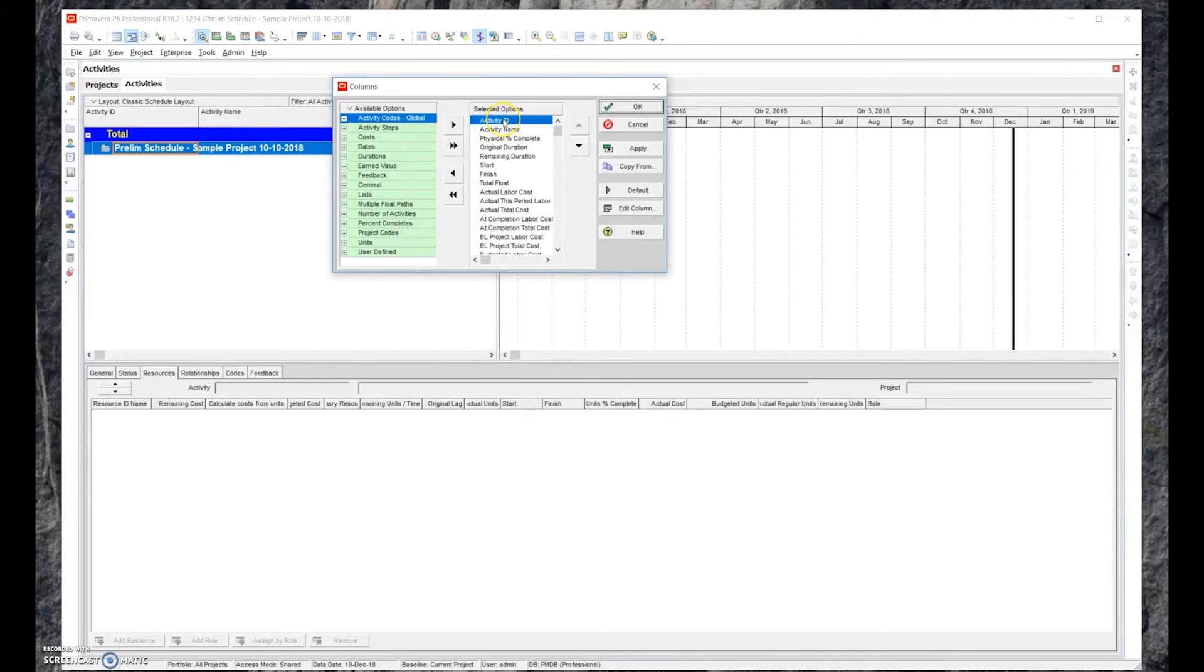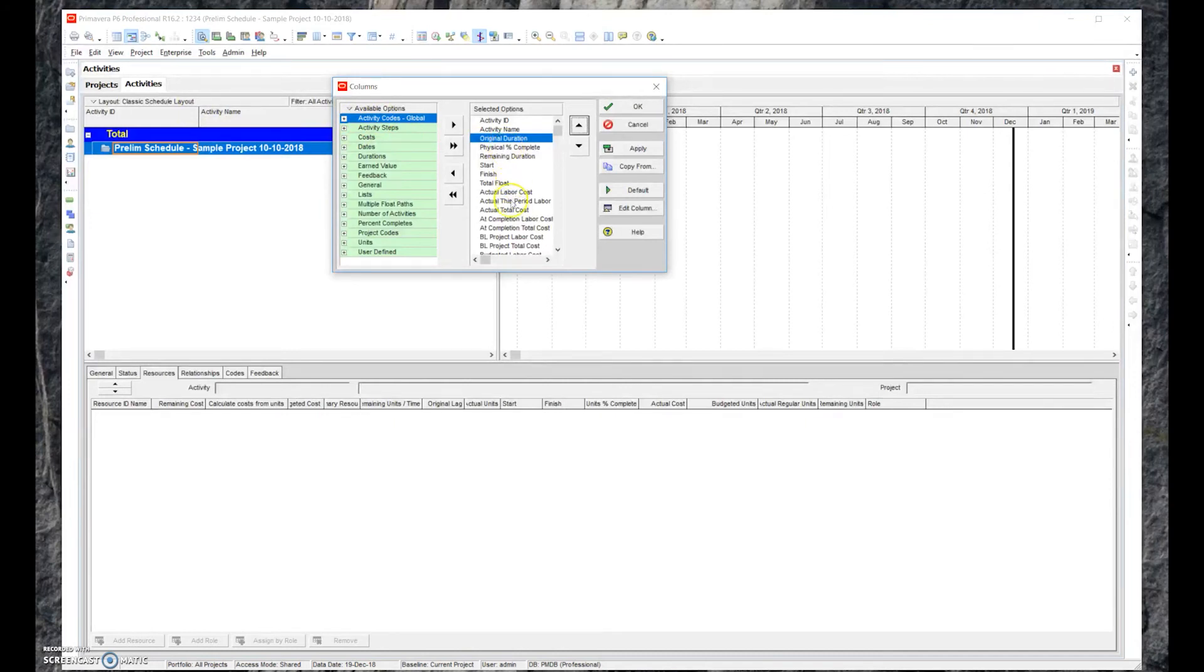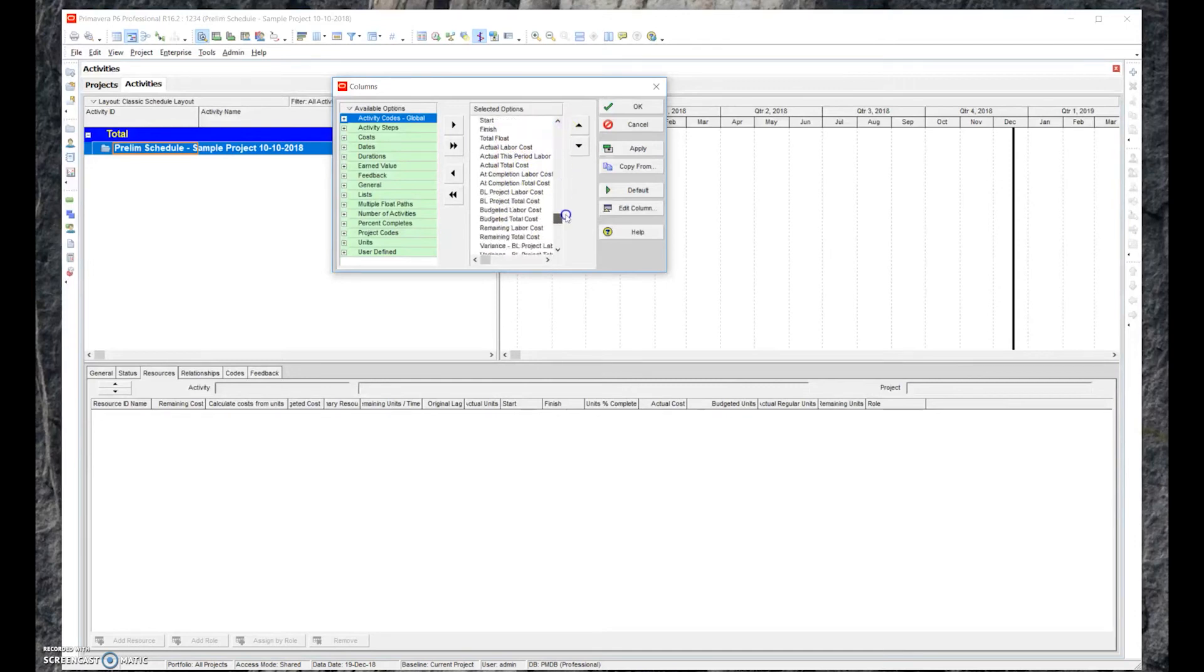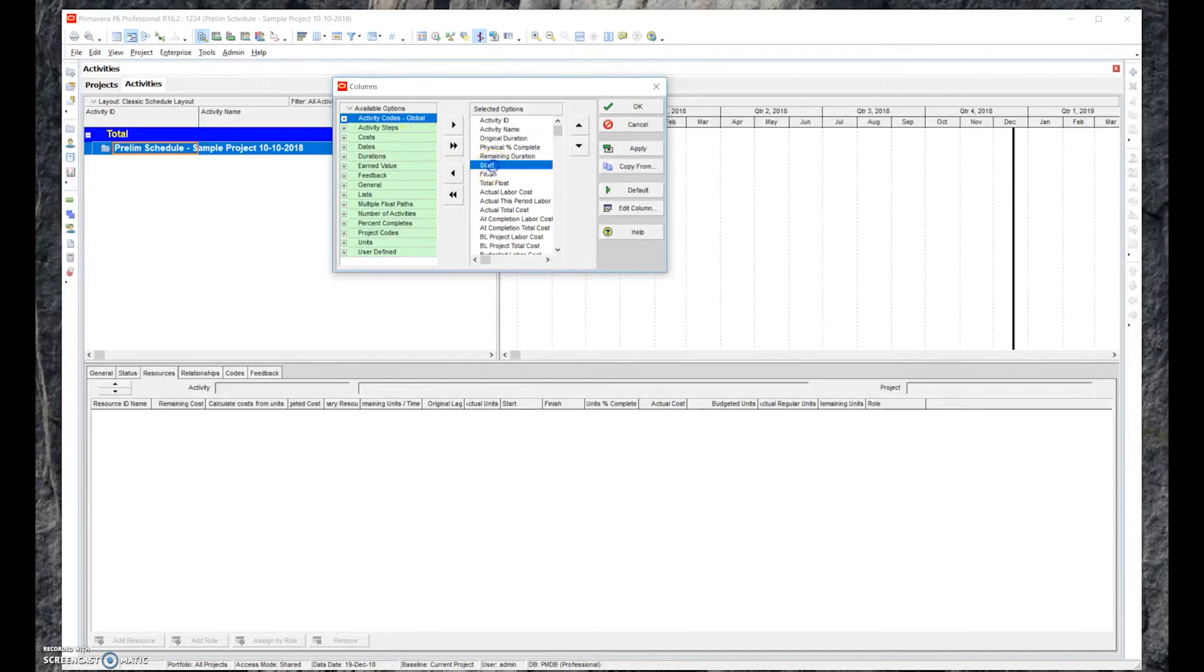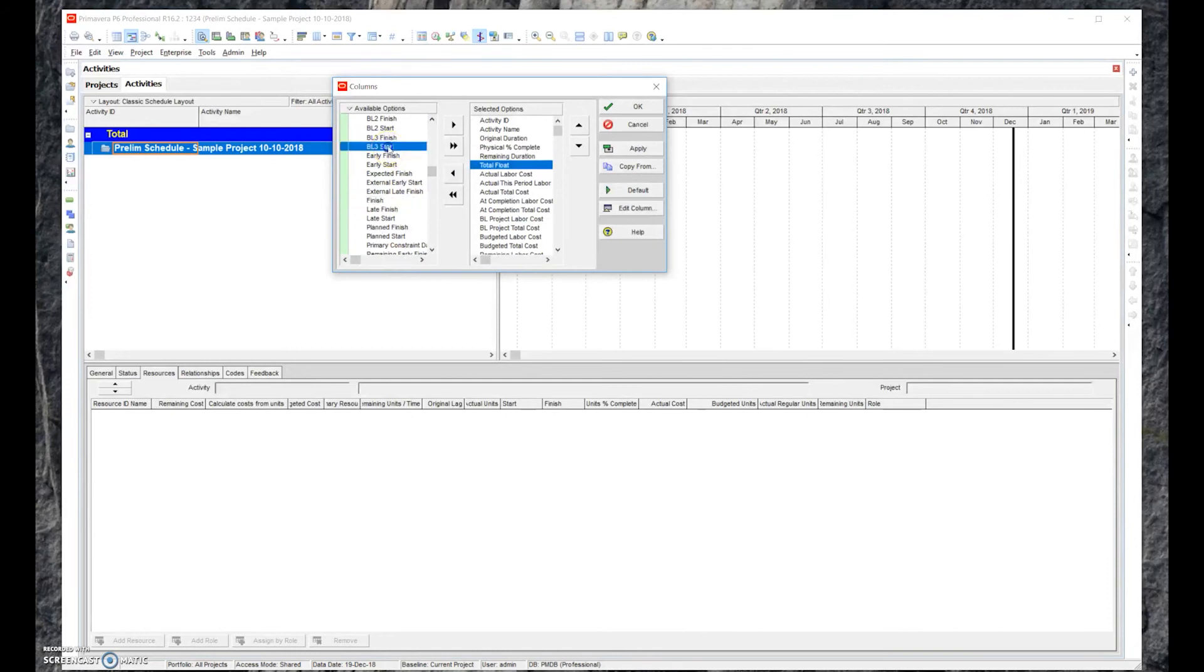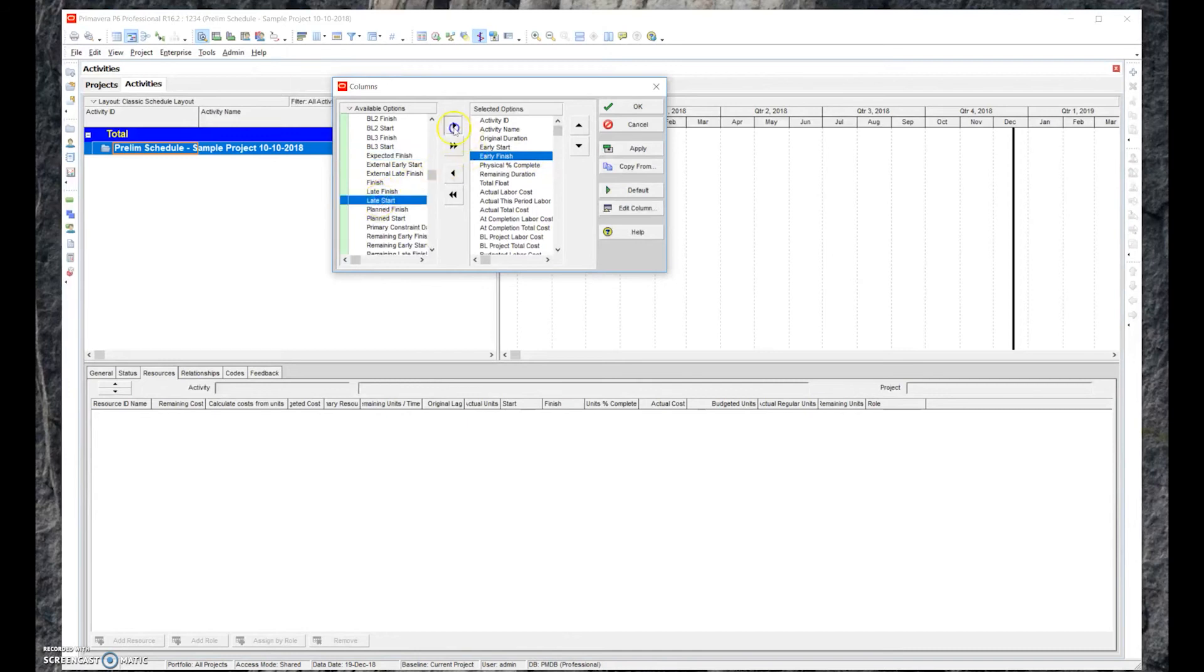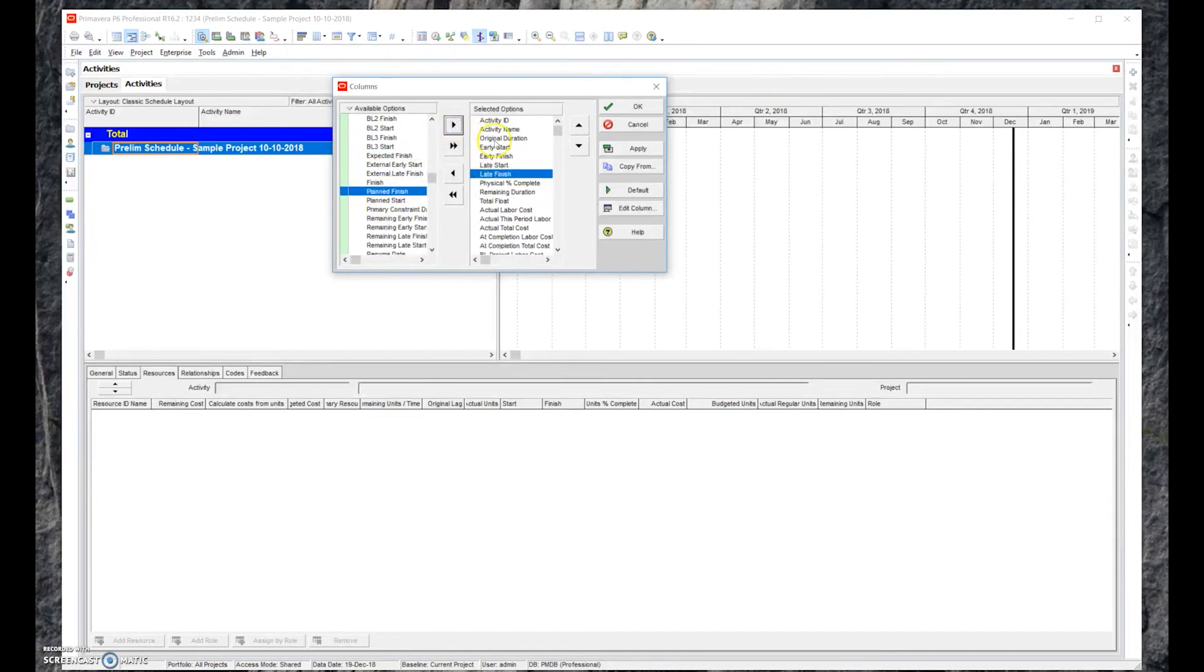Well, we need the Activity ID column. That's very important. We need the task or the activity name. The next one is duration. We want to have duration. You notice I moved it from one place to the other so it's organized in the correct way. Next item is early start, early finish, late start, late finish. I need to know those because I'm going to go ahead and take out start and finish. I want to have early start and early finish because those are key pieces of information that we need to know. So early start's right there, early finish is right there. We want to have late start and late finish.